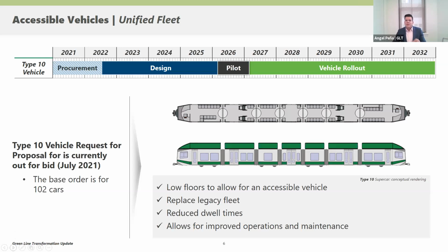During the time from the anticipated arrival of a pilot car, estimated in 2026, to the fully deployed fleet in 2032, the team will continue to plan improvements needed to provide for 14 inch raised platforms, which allows for level boarding.